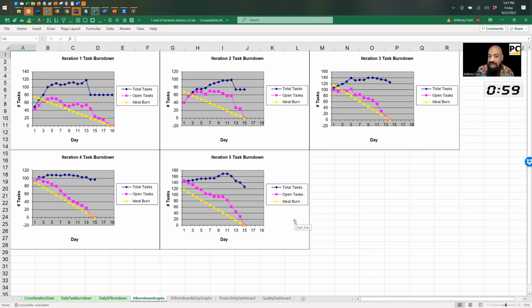And so we talked to them, and guess what happened? Their product owner was changed. And the new product owner says, I want to change a bunch of stuff. So when you destabilize a team, this is exactly the kind of thing that happens. Honestly, this team did remarkably well, given that they had a product owner change. And the product owner change absolutely disrupted them. So this team is a hero team. You might think they got worse, but in fact, they were able to navigate something quite challenging.